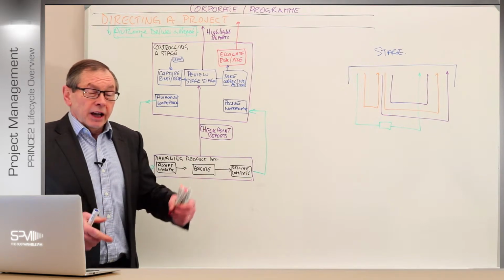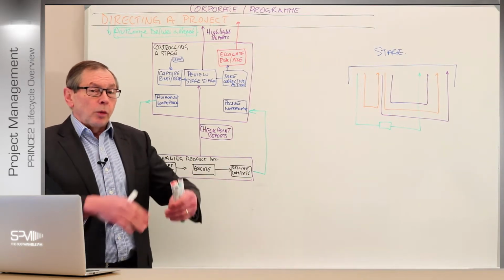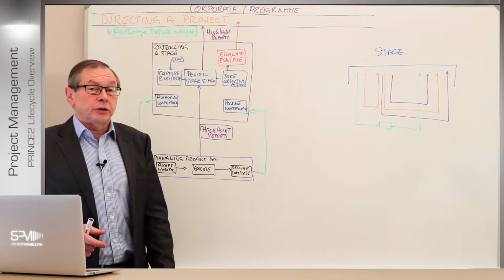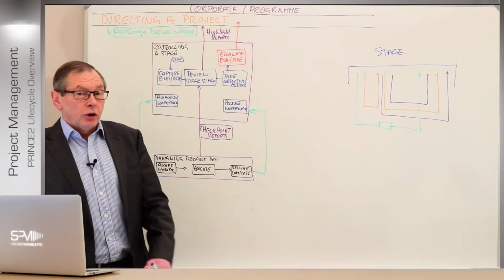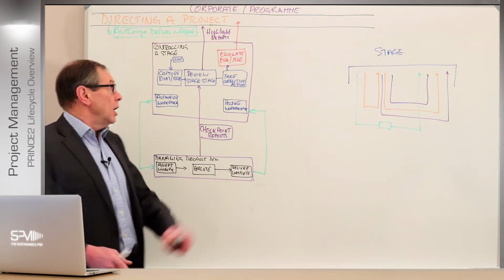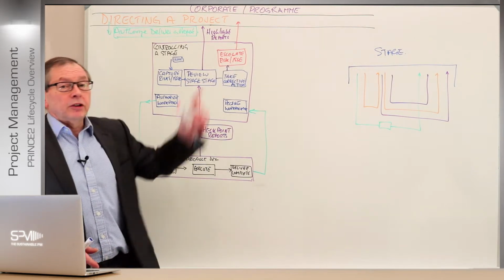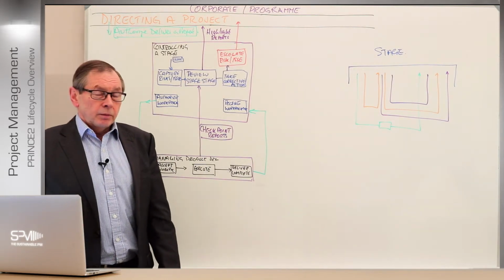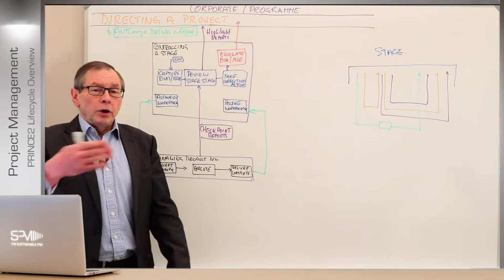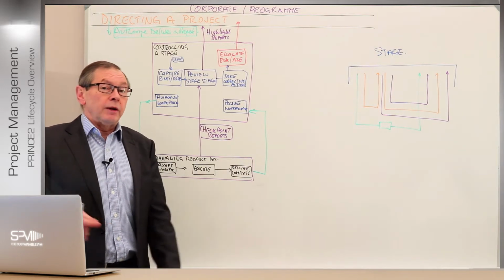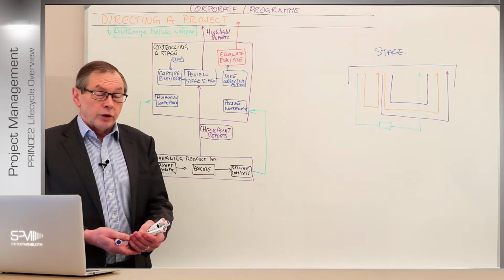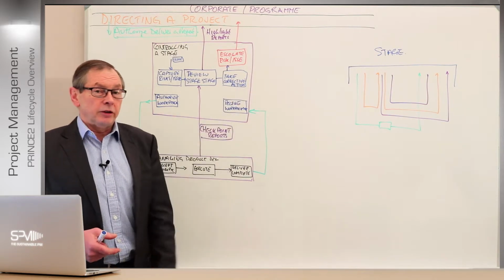Now, if that means that whatever's going to go is going beyond the bounds of the particular stage at this point, then we have to go to the next level, which we'll look at in a minute. The first thing is, can we fix it up within the bounds we've got already? If we can fix it up and don't go beyond the 6-week time frame, for instance, then we can carry on with the project and we can fix up the issue because we've now had a decision to do that.